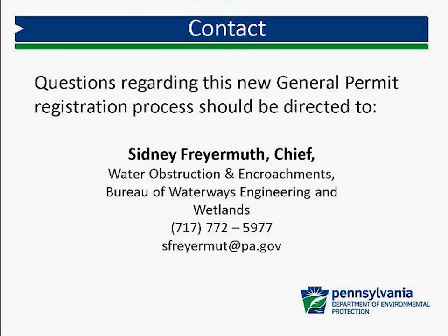Is a wetland delineation report needed for all general permits or just those that impact wetlands and streams? Well, you need a wetland delineation report for the GPs where you're impacting wetlands, yes. You wouldn't need it for streams.